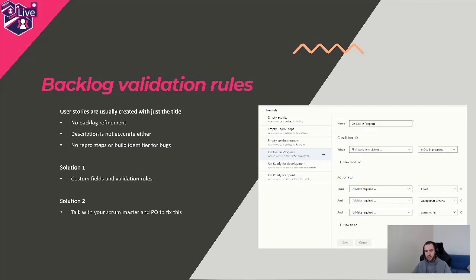Whenever we found technical debt or new features, we were so busy doing actual development that we forgot about writing things correctly in the backlog. The next time you went to do the work you'd planned previously, you never knew what to do because with just a title you didn't have enough context. We were removing bugs or features or user stories without any implementation because we forgot what we needed to achieve.